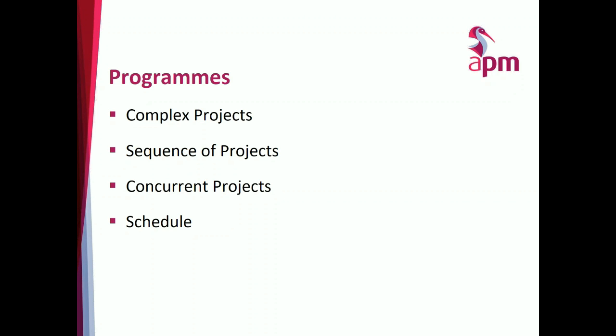That would have been a piece of metal sitting on the ground somewhere, looking smart, looking threatening, but of no military use. The program was involved in delivering the benefit associated with that helicopter through a range of projects that looked at how this was going to be delivered, what the infrastructure support was going to be, where the training came from, what the data flows needed to be, what the logistics support was, but based around a single project, albeit a very complex one.